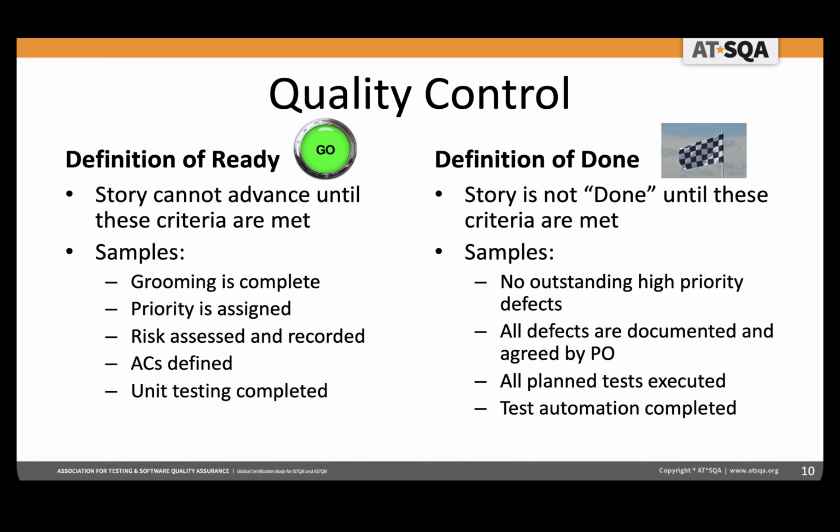Now, the definition of ready can be defined at multiple stages in the life cycle of a story, but you commonly see it from the point where the story is defined and before it goes into development. So that's really a key definition of ready. And then the next one is when it comes from development into testing. So you tend to see it in those two places. But you can define a definition of ready for anything that makes sense as a step or a stage in the process. Now, people that are working with Kanban boards, for example, you often have a definition of ready for each stage in the workflow.